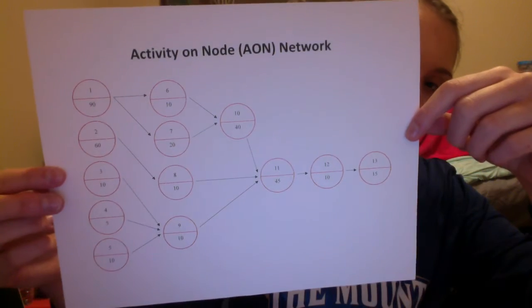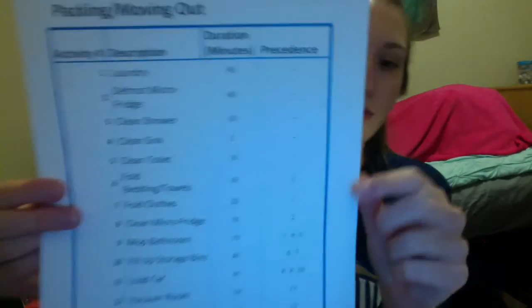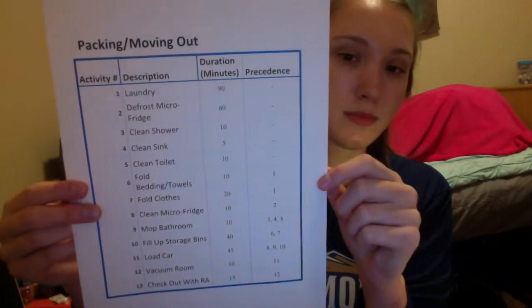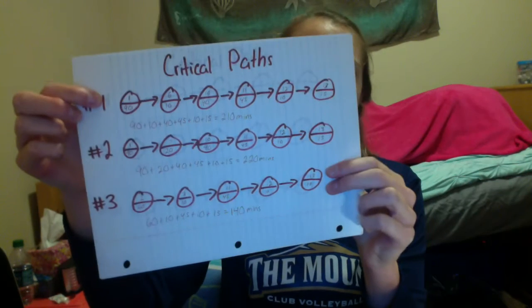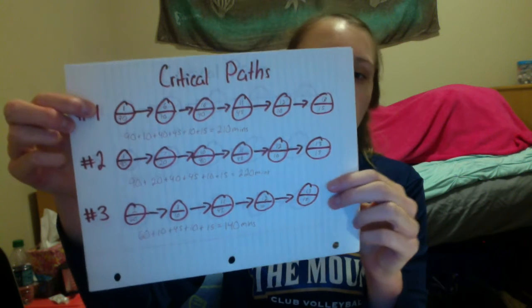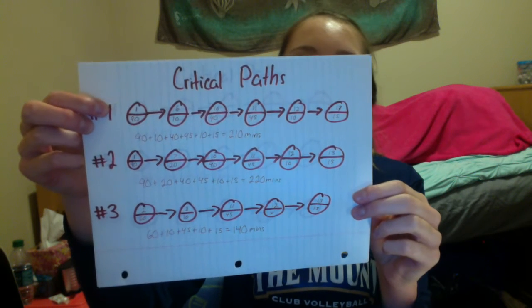Now that we have completed our AON network, based on this table we can find our critical path. To find the critical path, you must first list all network paths. Once we identify the network paths, we can then calculate the sum of the durations for each one. For path number 1, we have activities 1, 6, 10, 11, 12, and 13. Their durations add up to 220 minutes.